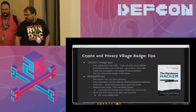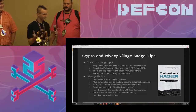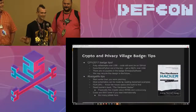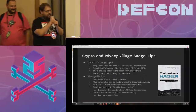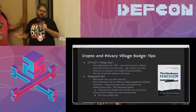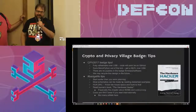Yeah. So be very aware of every part on your bill of materials. Some parts you think there would be enough for, and you go to order them, and there are not 500 in the world. You cannot buy them without an 11-week lead time. That is not going to make it work in June. Oh yeah, by the way, we got a recommendation for a voltage regulator from Unofficial, and it was a great power regulator, and so we put it on our first prototype, and then we go to actually build them, and it turns out Unofficial bought out the entire supply of them.